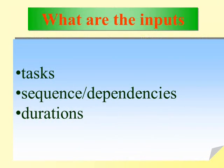What are the inputs for critical path analysis? Tasks, sequencing of those tasks, and durations. You cannot build a house without first digging the foundation. Foundation comes before roofing. You cannot install plumbing devices in the building without having the drywalls or the walls. There are some tasks that need to follow themselves in sequence and they have vital dependencies.